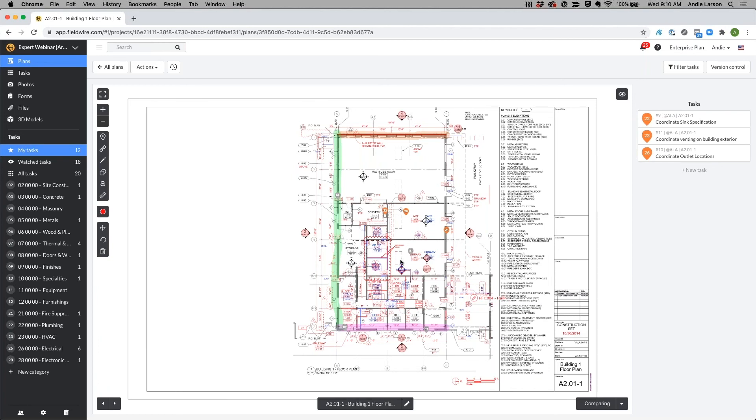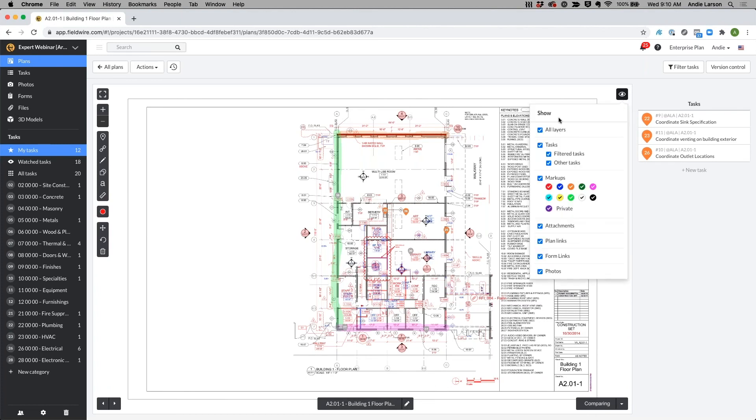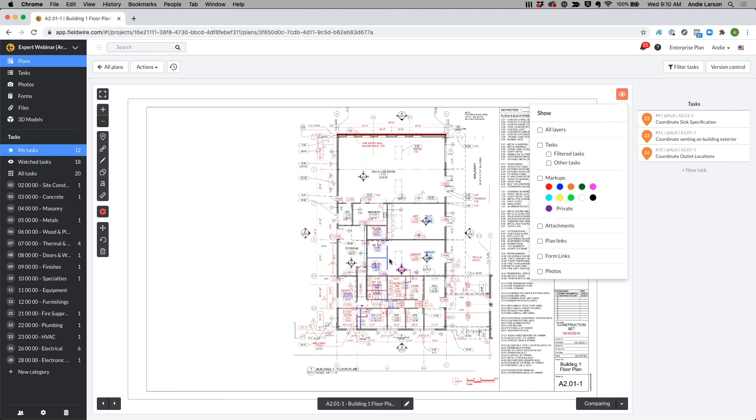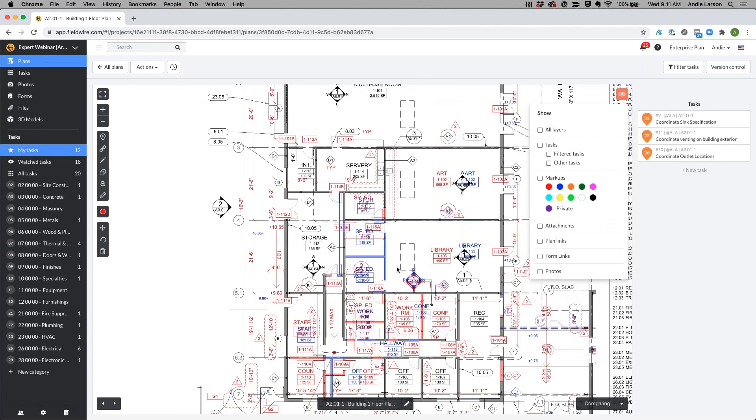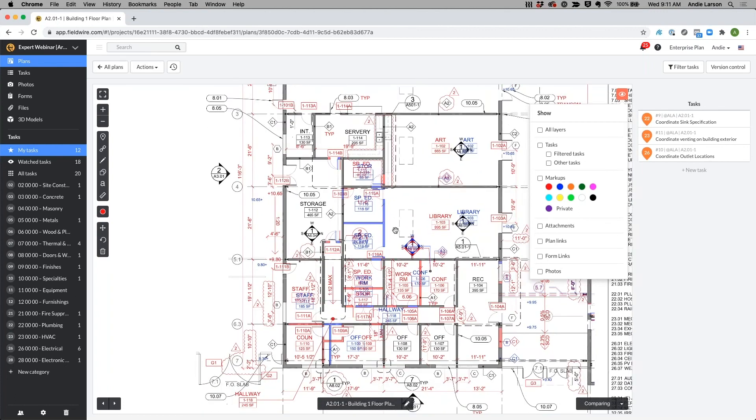So in this example here there's a lot going on so I can turn off my layers, just toggle these on and off. Now I can easily see this wall over here has been added, this red wall has been removed, but if I zoom in a little bit closer I'll notice that we didn't actually cloud any of these changes, we need to go back, cloud these and assign the delta number to them.